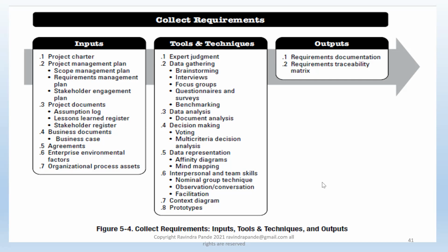Same thing with robotics. Same thing with really mission critical projects like a US military project. You want to check out a certain specific terrain for a new military camp, a new military base. So you send some drones, you send some land analysts or scientists and so forth, and you analyze, explain, or build a small part of that, and then you start planning the bigger project. That's why prototypes are very crucial for such mission critical, cost critical types of projects.